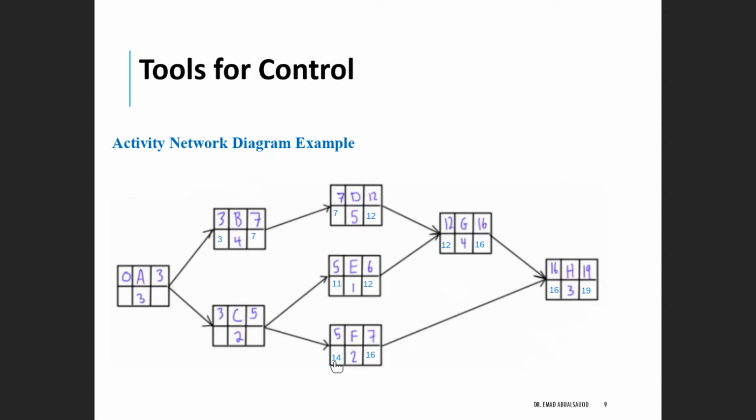So which one will we take in this case? We will take the least one, or the minimum one, or the smallest one. So we will have the 11 placed here, and we subtract 11 minus 2, it will be 9.